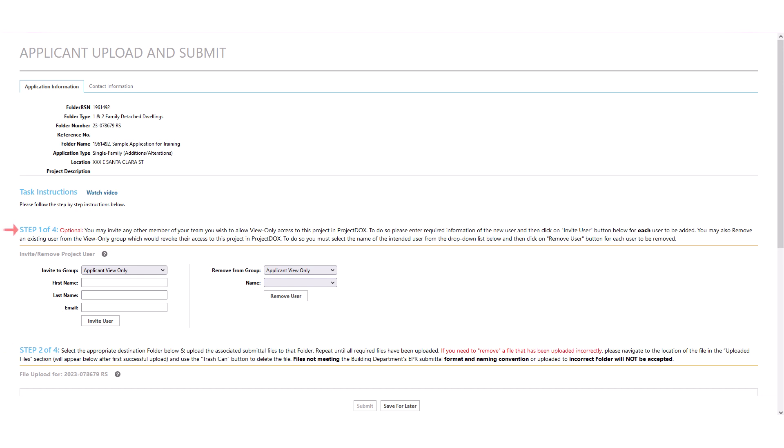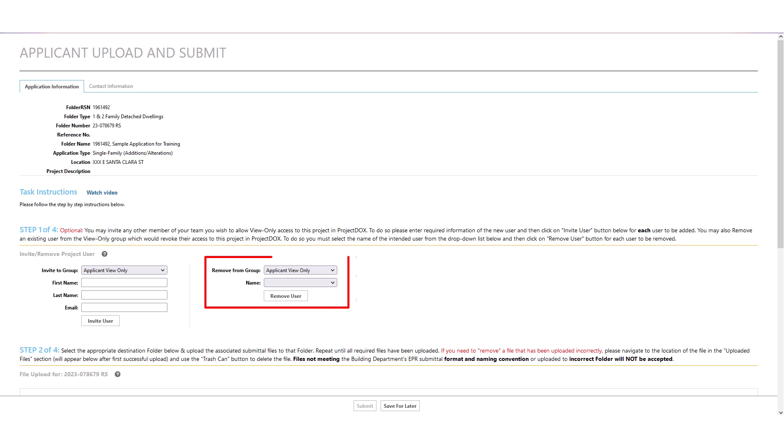In step 1, you can invite a new user to this project by adding them to the group selected from the drop-down menu. For example, you can add the property owner or their representative to the applicant view-only group, which would allow them view-only access to this application. However, a member of view-only group will never be assigned a task. You can also remove a previously added user from the selected group using this section.